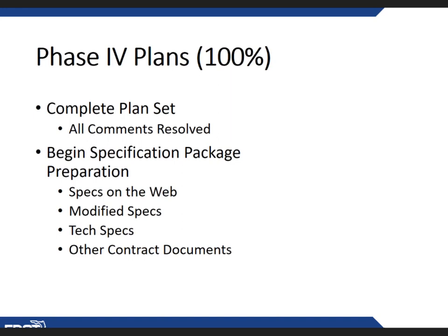So this is not the time to write. It's not the time to request a modified spec. This is the time to prepare the package, to pull all those approved pieces together. And that's why we have this lead time that information has to be in the districts or it has to be in central office. And sometimes that's 3 months before a letting. Just because you have that time doesn't mean that the design continues.